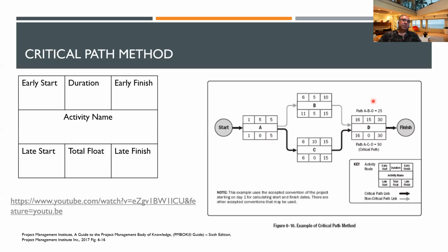If you think of it this way, here, activity B has a 5 days float. So, can anybody tell me what does 5-day float mean? How long can you delay this activity? Can you delay this activity by some days? If it's delayed for 2 days, is that okay? Yes, sir. Why is it okay? Because maximum we can delay is 5 days.